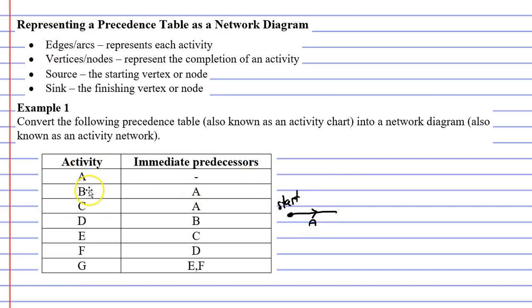Next, you'll notice that activities B and C come after activity A has completed. We can see that because activity A is the immediate predecessor for both activities B and C.